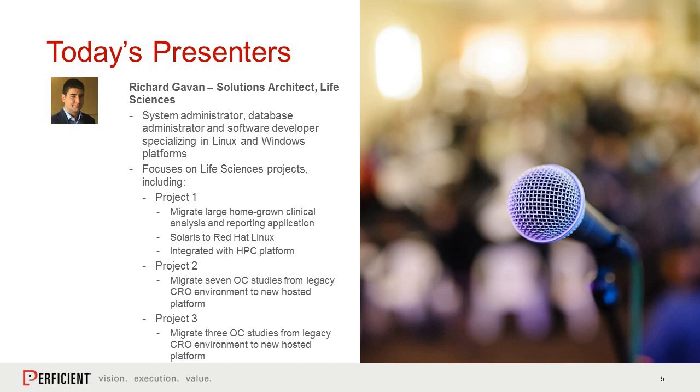In both of those projects and many other projects we worked on, we cannot just wholesale pull all of the data, because there are other studies in there that the previous vendor cannot allow to be exposed to anyone besides those that are supposed to be working with the study. So there's a lot of sensitivity there, and you have to be able to export only the data that you need that is within the scope of the migration. That presents a challenge.